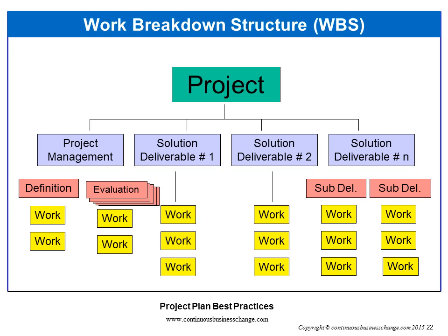The start and end dates for the tasks are entered into your schedule. All work must be included in the WBS, including the work of creating the plan, facilitating team meetings, and so on, i.e., the project management work. In order to ensure it's manageable, we suggest keeping your WBS to 3 levels: deliverables, subdeliverables, and tasks or work packages. There is a video in the project plan guide that describes in detail how to create the WBS.